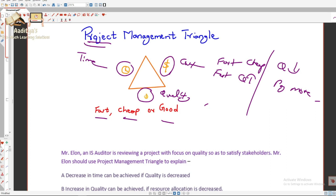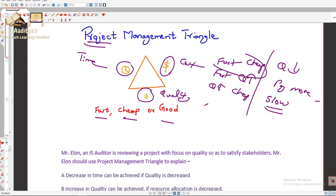If you want something of very good quality and at a cheap cost — you want good quality but cannot pay more — then you will have to compromise on time; you will get it slow. You cannot expect it fast. This is the concept: you can only achieve two things and must compromise on the third. The area of the Project Management Triangle will always remain constant.